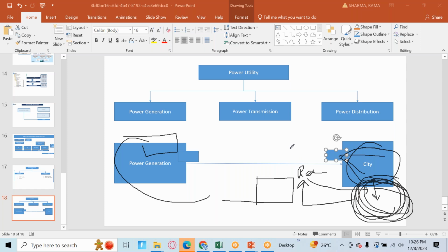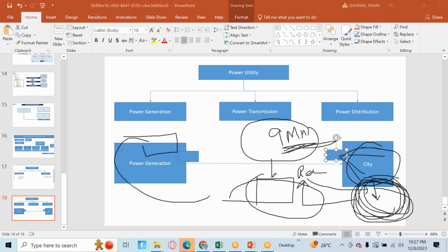So 9 million, before it was 10 million, that was my planning value, and 9 million has become my budget value now. So this 9 million has to be transferred to the project to execute it, then only this new plant will be constructed, right? So this 9 million will be transferred and it will be available in my project, and then it will be constructed further.